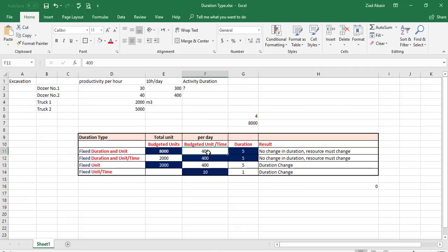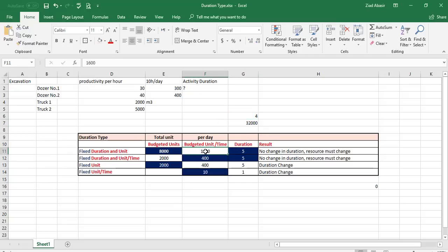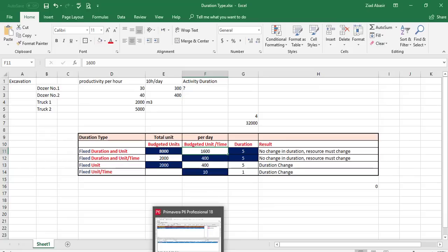So to finish in five days, you need to add four dozers. The budgeted unit per time would then be 1,600. You can't assign 1,600 to a single dozer because the productivity per dozer is only 400 per day — you must add four dozers with the same productivity. Let's apply this in the activity.